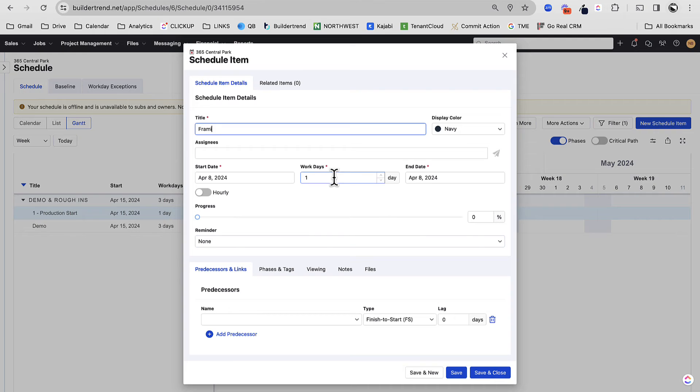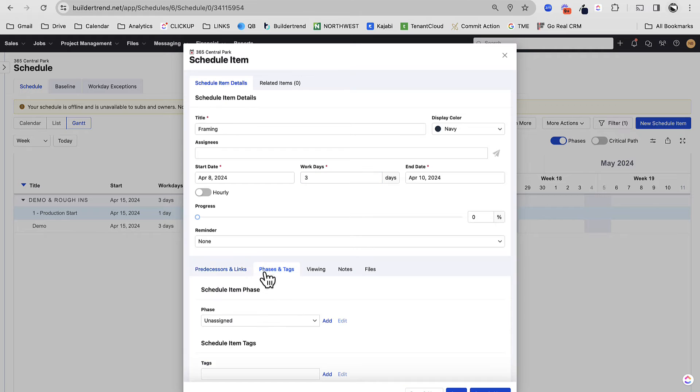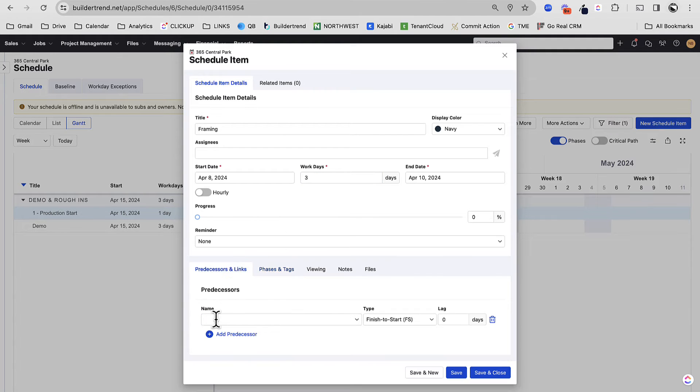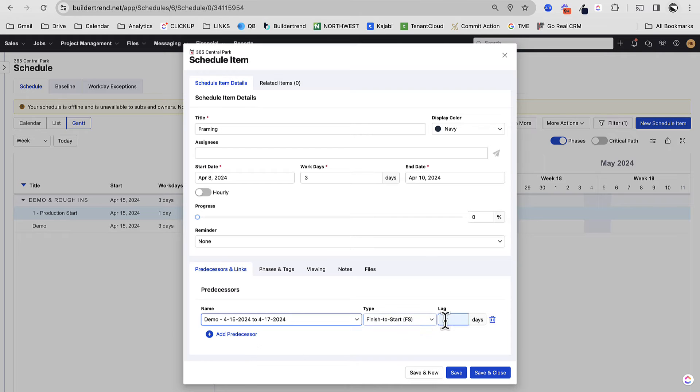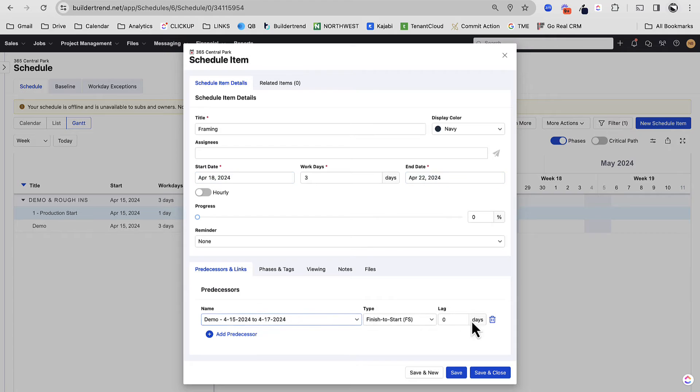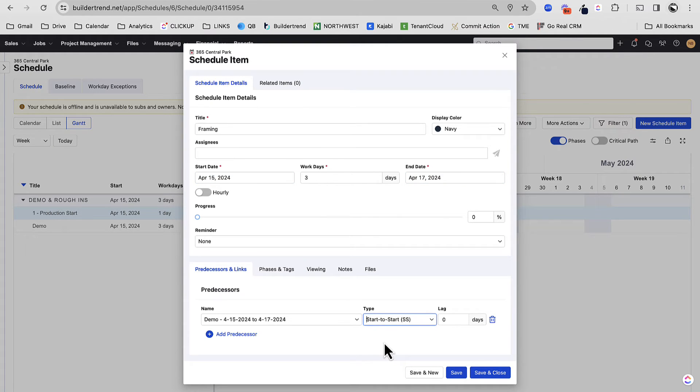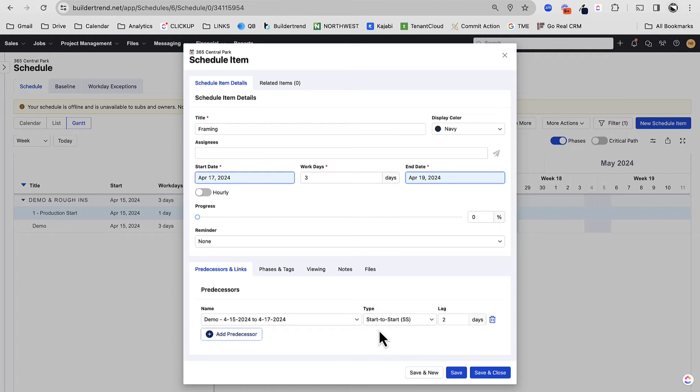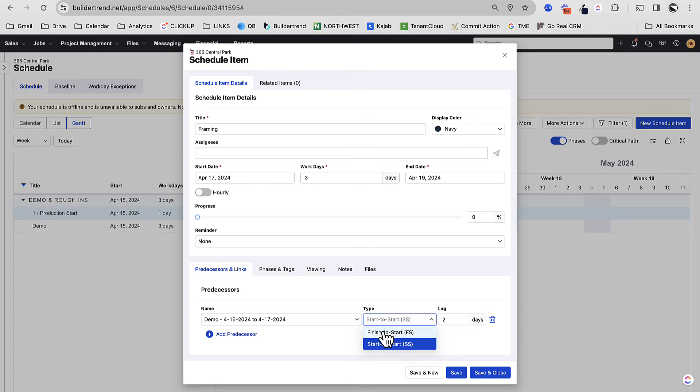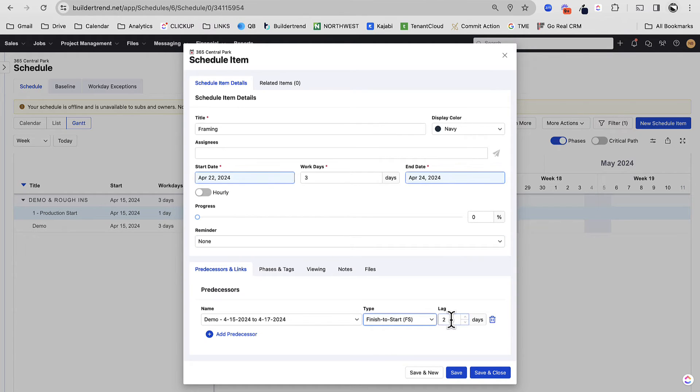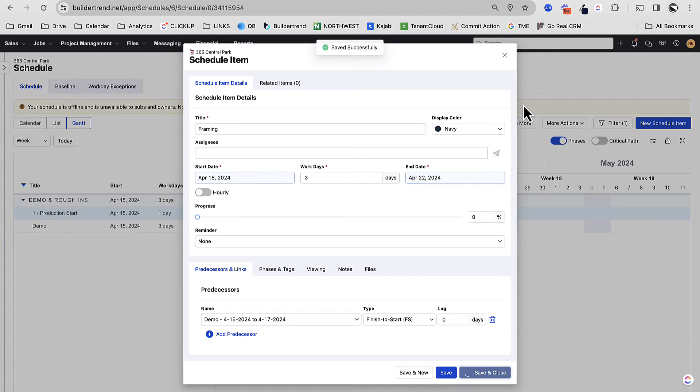I'm going to create another scheduling item. Let's just call this framing. Let's say three. And just like I was doing before with the demo, I'm going to assign this to demo and rough ins and I'm going to make this dependent on demo. Now these are finish to start. So meaning when demo finishes, my framing would start. If I made the start to start, it would mean when demo starts, my framing can start, but that's not the case. For this, I'm going to do finish to start once my demo finishes, my framing can start on that day.